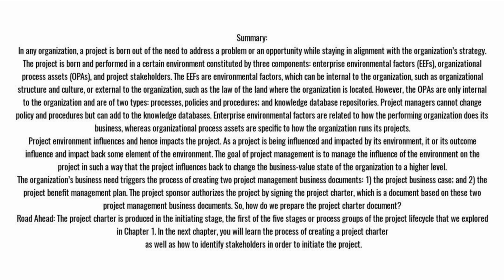The organization's business need triggers the process of creating two project management business documents: 1. The project business case, and 2. The project benefit management plan. The project sponsor authorizes the project by signing the project charter, which is a document based on these two project management business documents. So, how do we prepare the project charter document?